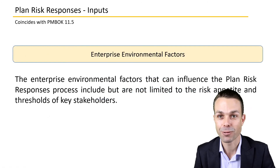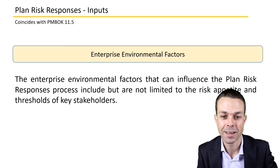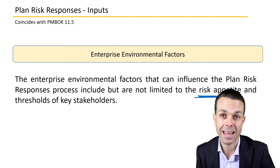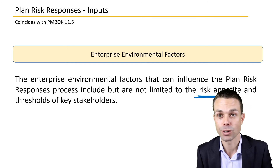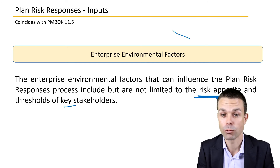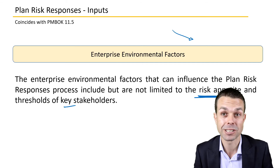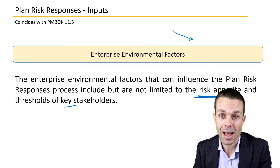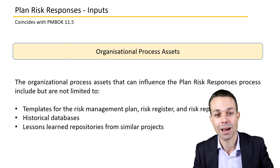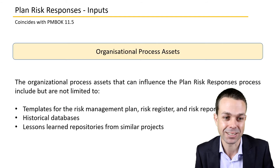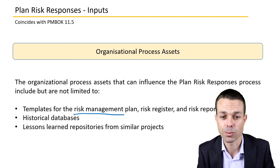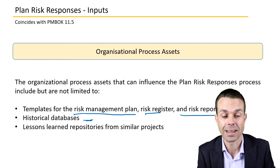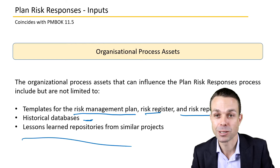Enterprise environmental factors include the environment we're operating in — in particular, the overall risk appetite and thresholds of key stakeholders. If there is a low risk threshold, we may need to do serious work when planning risk responses to bring those risks back under control. Organizational process assets include templates for the risk management plan, risk register, or risk report, as well as historical databases and lessons learned repositories from similar projects.